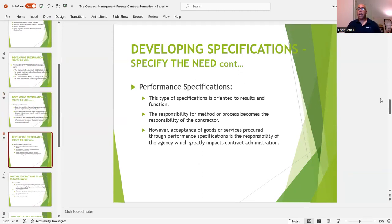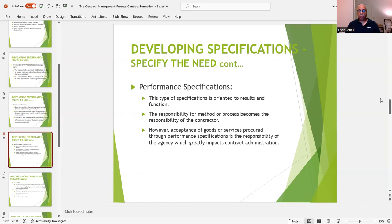Now we have performance specifications. This type of specification is oriented to results and function. Within performance specifications, the responsibility for method or process becomes the responsibility of the contractor. However, the acceptance of goods or services procured through performance specifications is the responsibility of the agency, which greatly impacts contract administration.